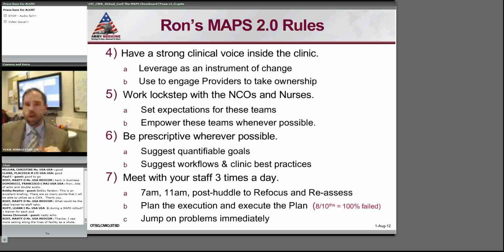Time is your most precious commodity during a MAPS 2.0. We only have 5 shopping days of 60-minute appointments. You cannot wait for anything to go wrong. If there's an issue, you need to get after it immediately. This is a huge element that's often overlooked. Talk with your team about where we are. You see the whiteboard examples from Wiesbaden. What are our goals today? Where are we with team-based documentation? Where are we with the need to push out some AgIType macros? Who's pushing back on the front desk?